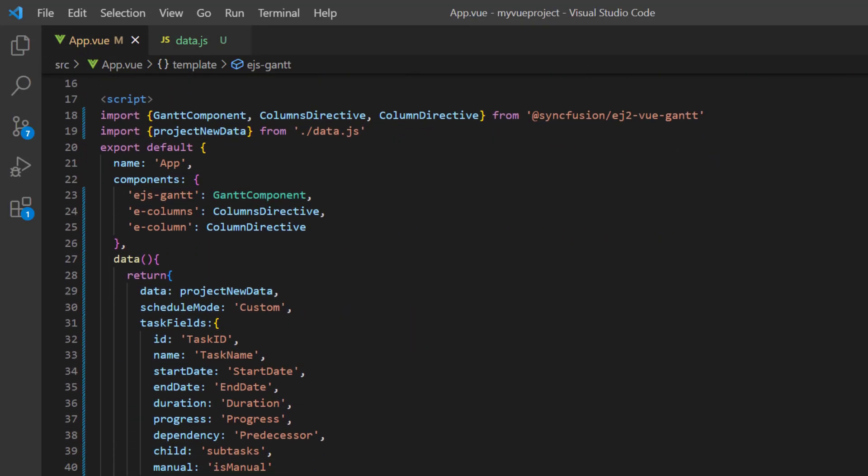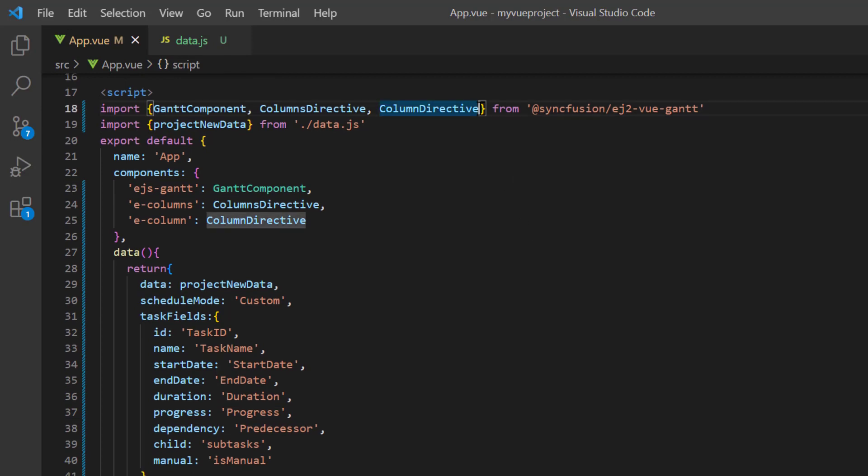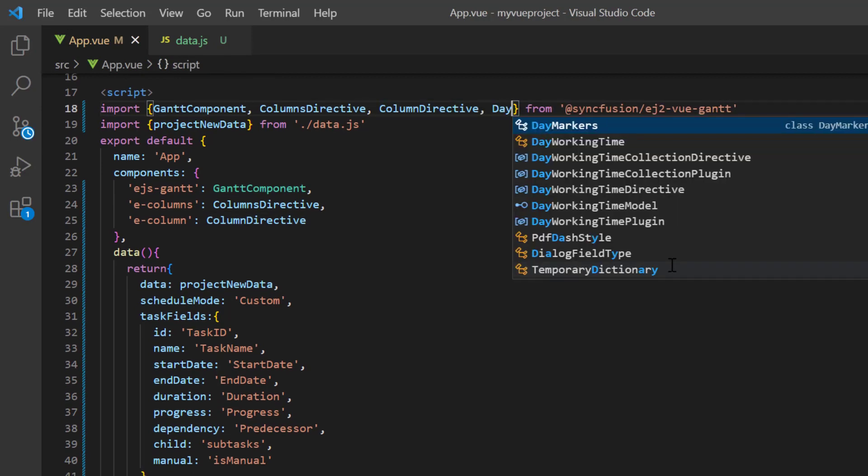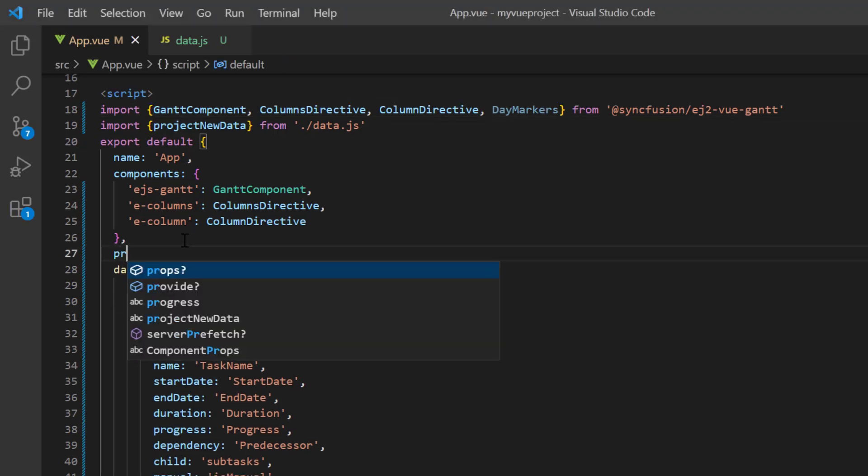To highlight the weekends in a project timeline, import the day markers module from the Vue Gantt package and inject it into the provide section.